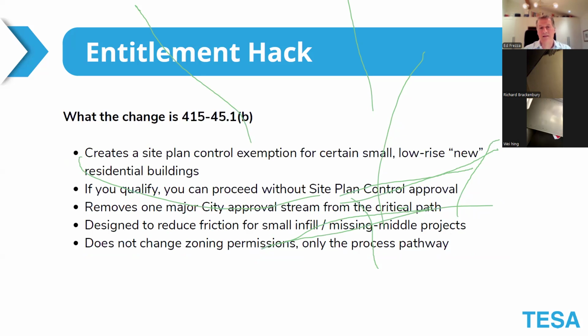So the change creates a site plan control exemption for certain small, low-rise, new residential buildings, right? If you qualify, you proceed without site plan approval, and that's time and money that you're saving, that in many cases is a deterrent. Many people won't want to go through that. And this is something that has recently been uncovered that is opening up the doors for your clients and for yourselves, those of you who are actually developing, right? So it removes one major city approval from the critical path, a major hurdle, if you will.